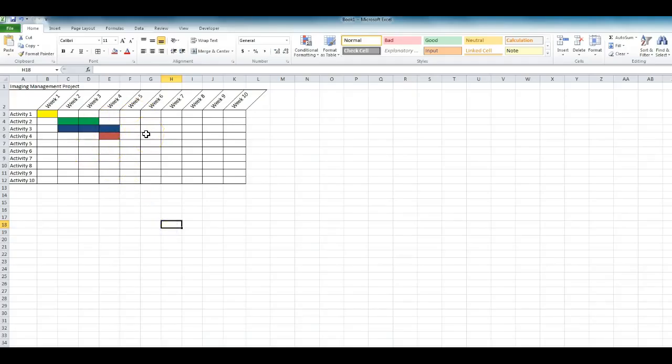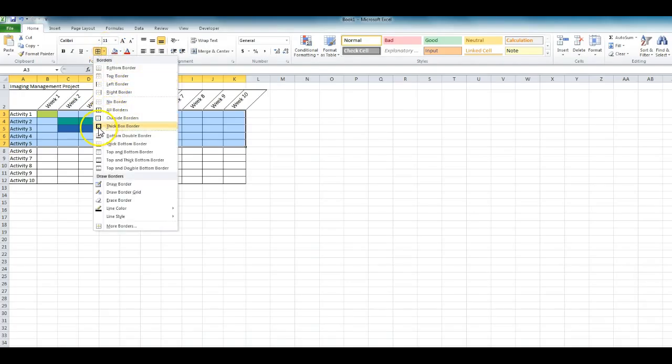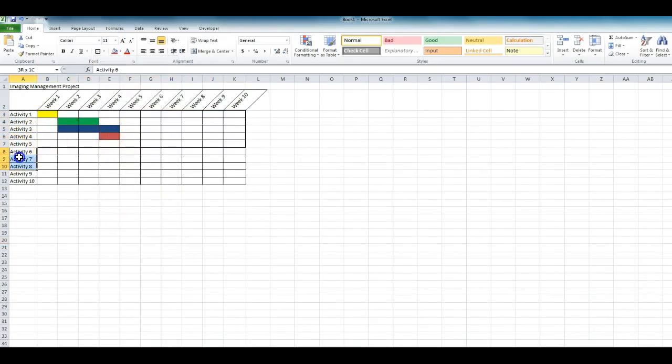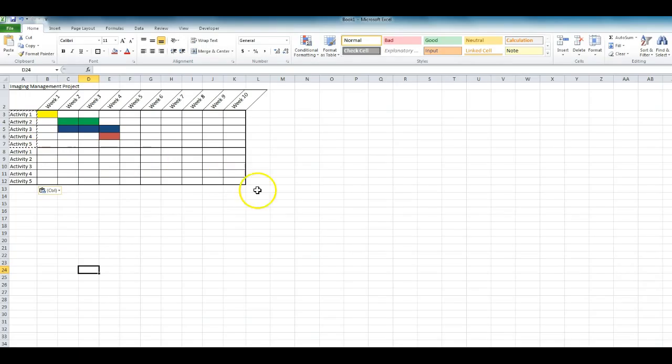So think about those parallel activities, think about those predecessor activities: what can work together, what has to be finished before the next thing can move on. That's essentially how you're going to set up your Gantt chart. Now, say you had activities 1 through 5 for one major idea. Just divide it off into block lines, kind of what you're seeing here. And then for the next series or the next piece of equipment, just start the labeling over again. It really depends on the look and feel you want, but it should give you an idea of what's happening when, so I know exactly what's going on in week 4, what should be starting, what should be finishing accordingly. Nice and easy process, nice and clean, and I think it'll really speed up the timeline in comparison to that bar chart.